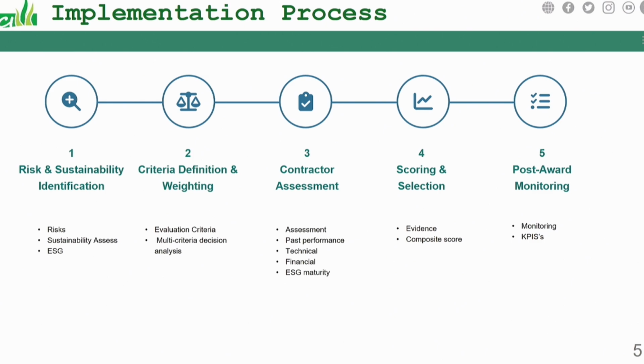In terms of contracting, you also insert some KPIs to achieve your goals, and as the execution goes on, you monitor to make sure those KPIs are met. Sometimes it can be health and safety, it can be quality, it can be where you want them to take care of the human factor. These are things you can monitor to make sure it goes right for you. There are four key areas you can look at.